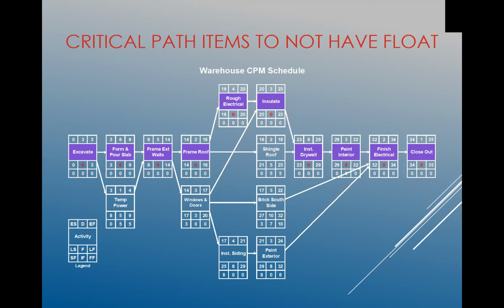So critical path items that do not have float. That's one reason this slide is here, just to show you. Our critical path items do not have float. If they move, your project completion date moves, period.